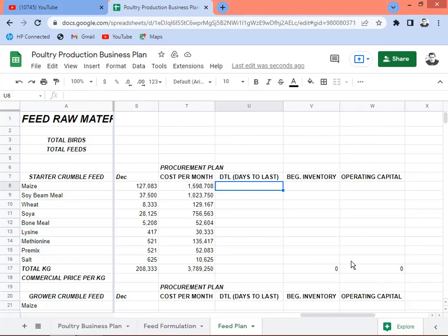This is the procedure that we do when importing materials from overseas, from abroad. If you're purchasing yellow corn, for example, from the US, from Argentina, from China, you need to process the LC, letter of credit. This would be a bank-to-bank transaction. So you need to consolidate the load.